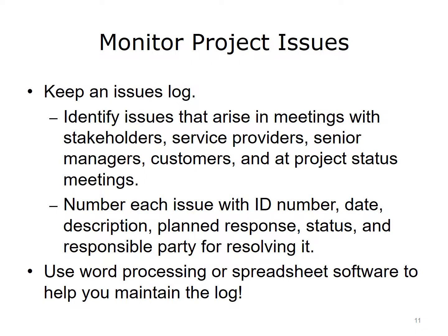As you monitor your project, an issues log can help you keep track of problems, both small and large. As you identify issues that arise in meetings with stakeholders, service providers, senior managers, customers, and at project status meetings, include them in the log. Assign each issue an ID number and include the date, description, the planned response, and the person responsible for resolving it. Update the log as the issue is resolved. You may wish to keep your log as a word processing or spreadsheet file. These types of software typically include sorting or other functionality that can be a great help in managing the details of various issues.